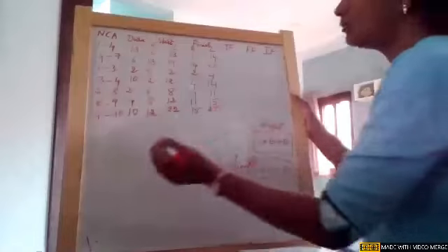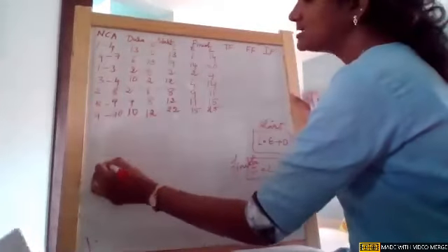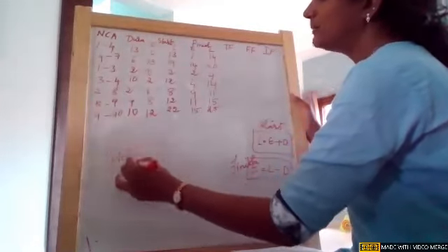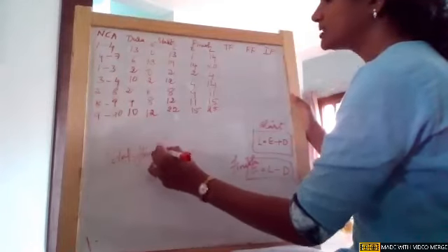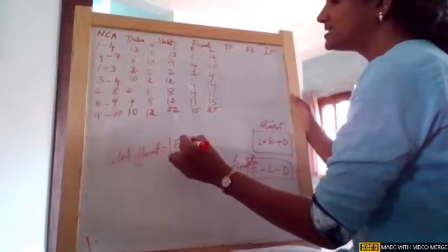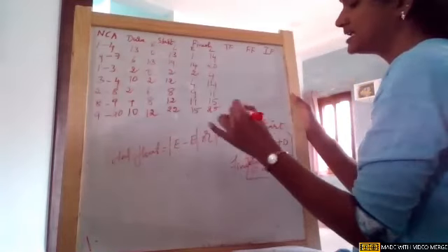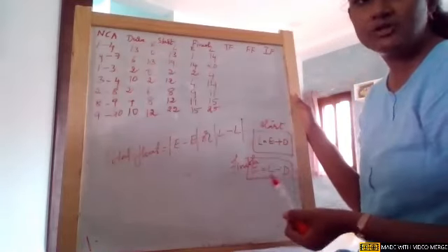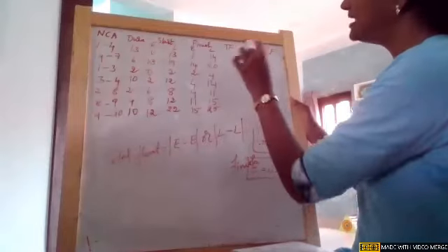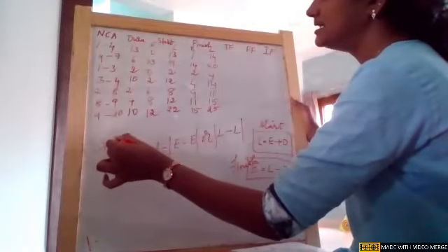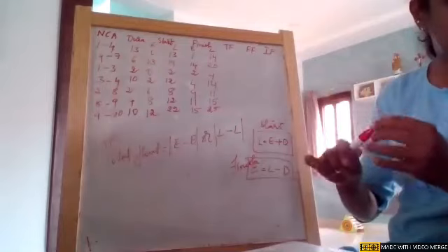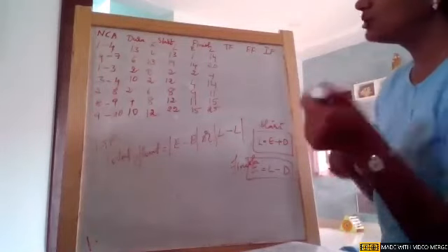Yeah, okay. Now we have three formulas, girls. Total float, you can make a note if you're taking notes. It is mod of earliest minus earliest or latest minus latest. Anyway, it is correct, the value is also the same. TF stands for total float.